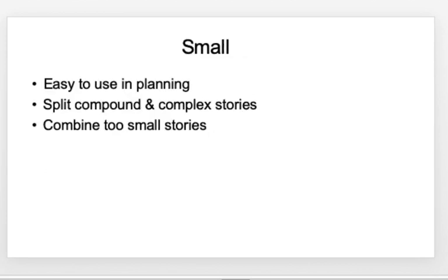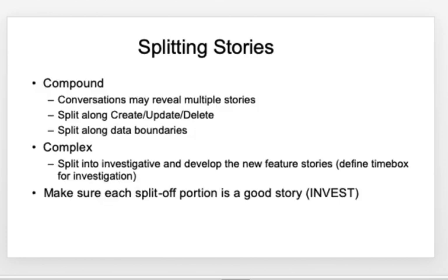Definitely it should be small. Split compound and complex stories into simpler ones. Combine 2 small stories into one manageable chunk. So you can split stories, compound and complex stories can be split into smaller ones. So make sure that each split off portion is going to be a good story as well.